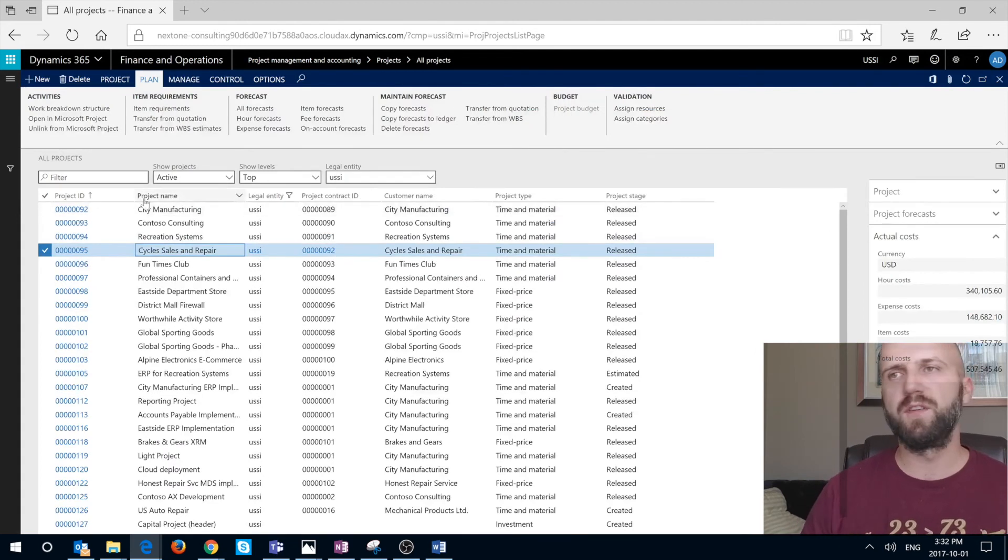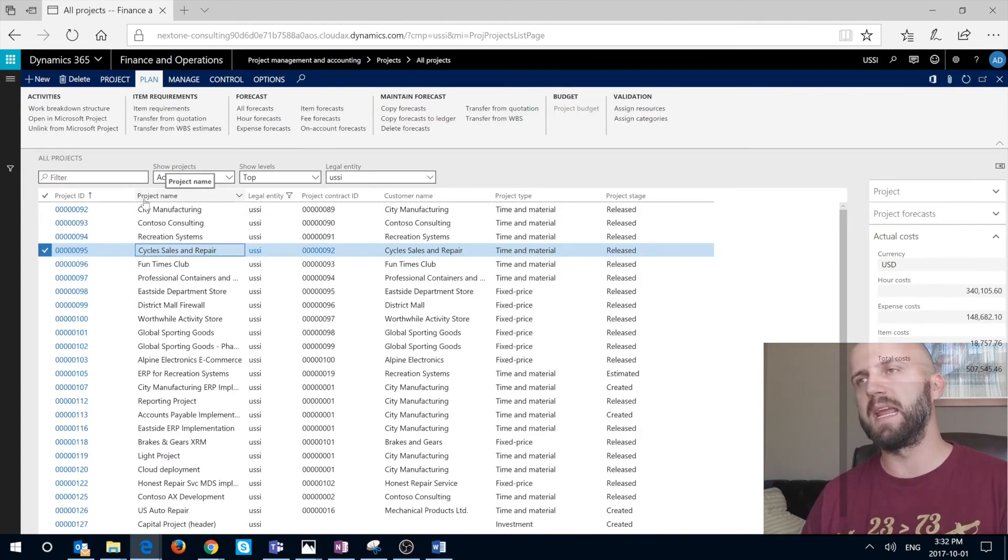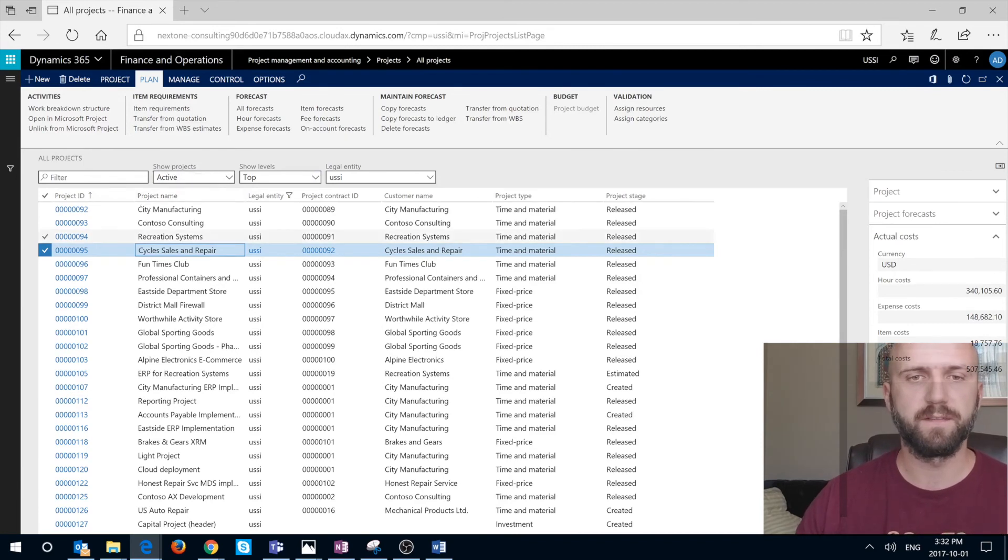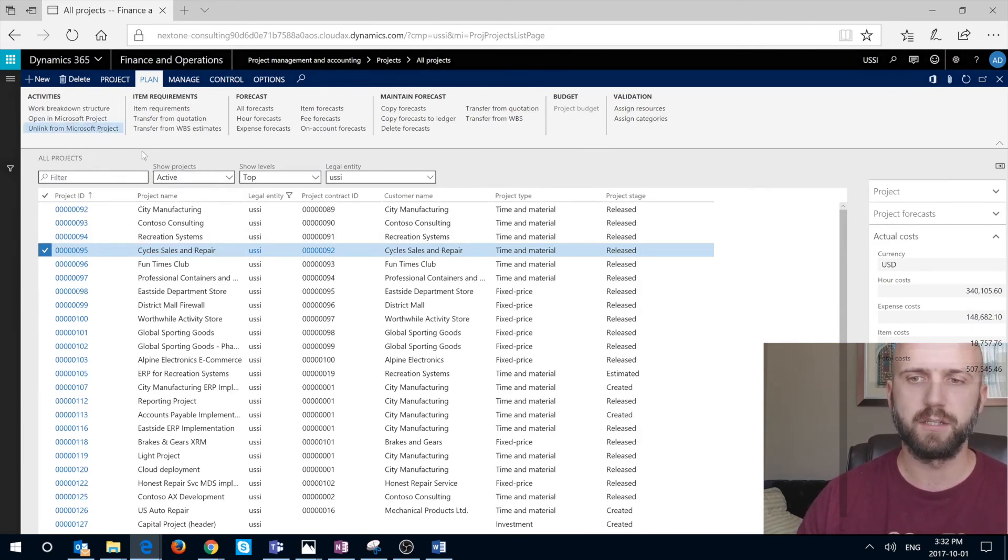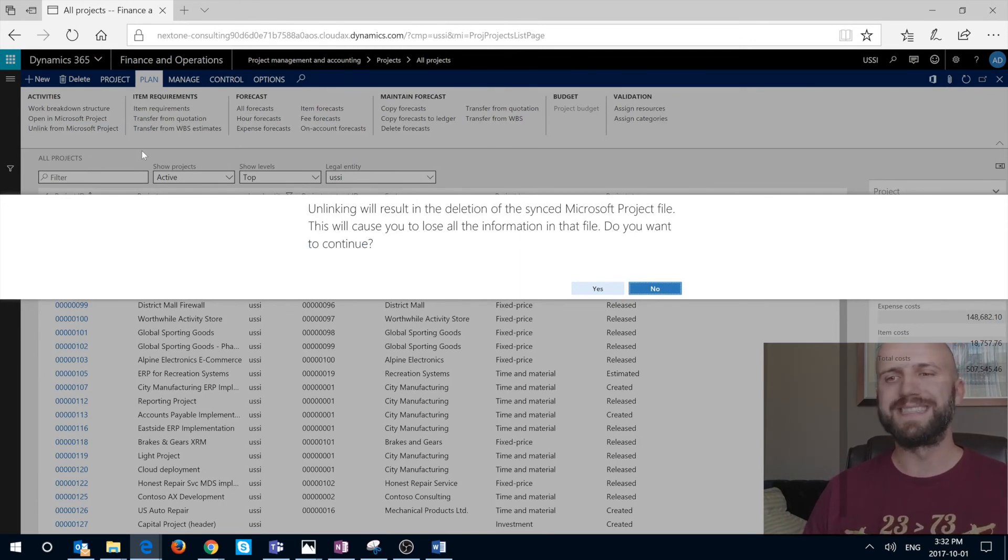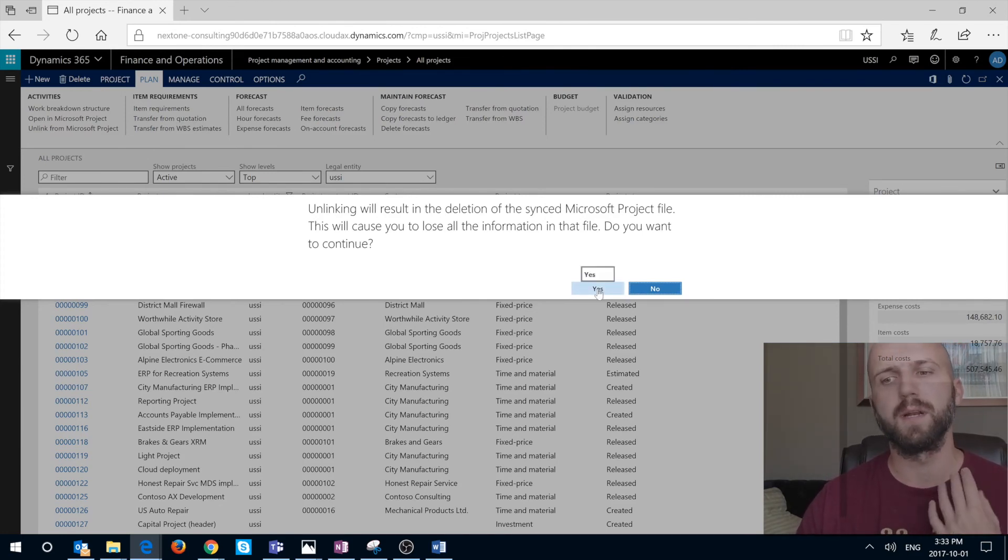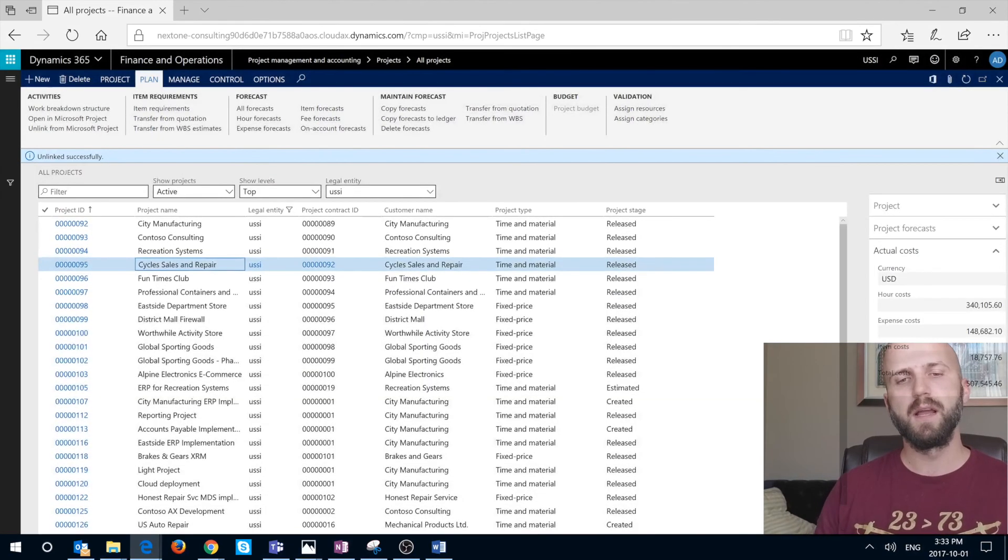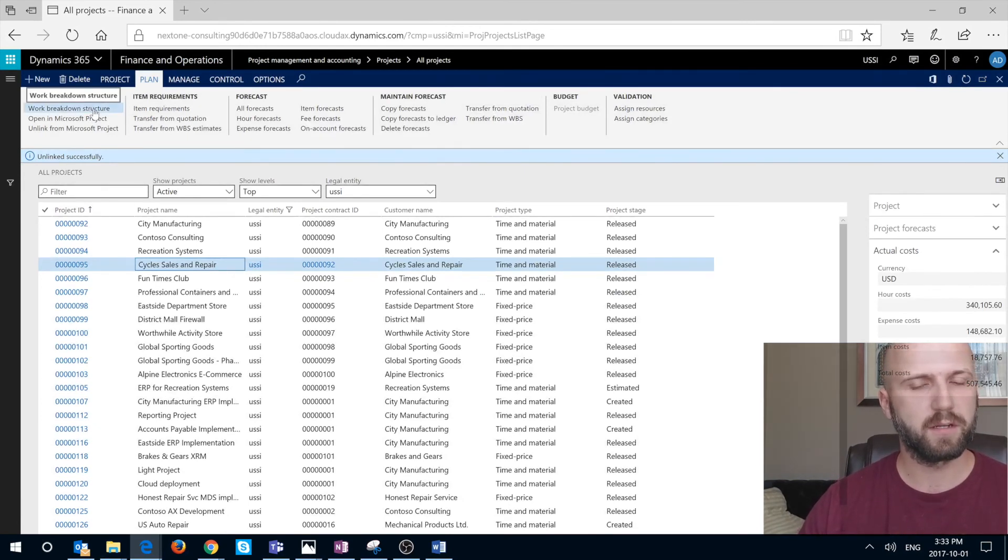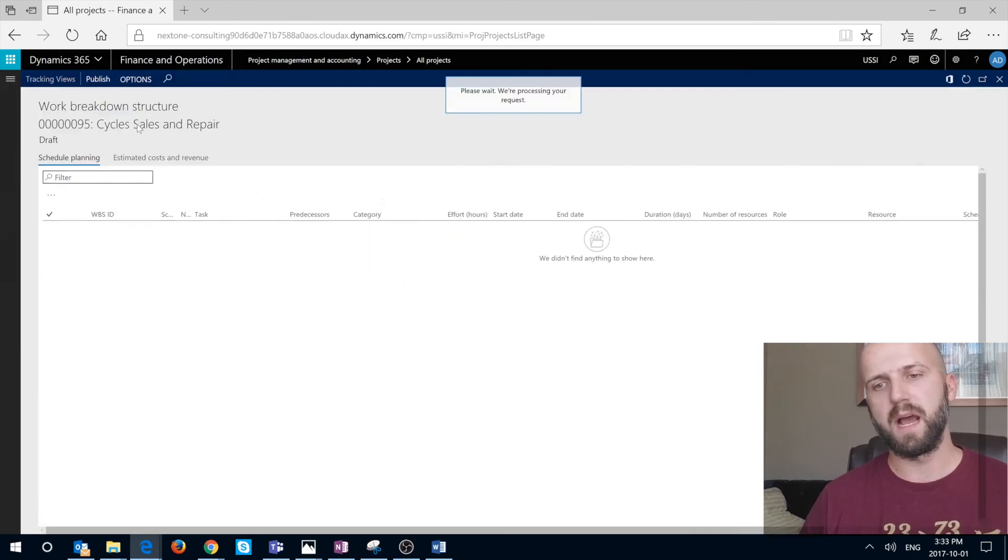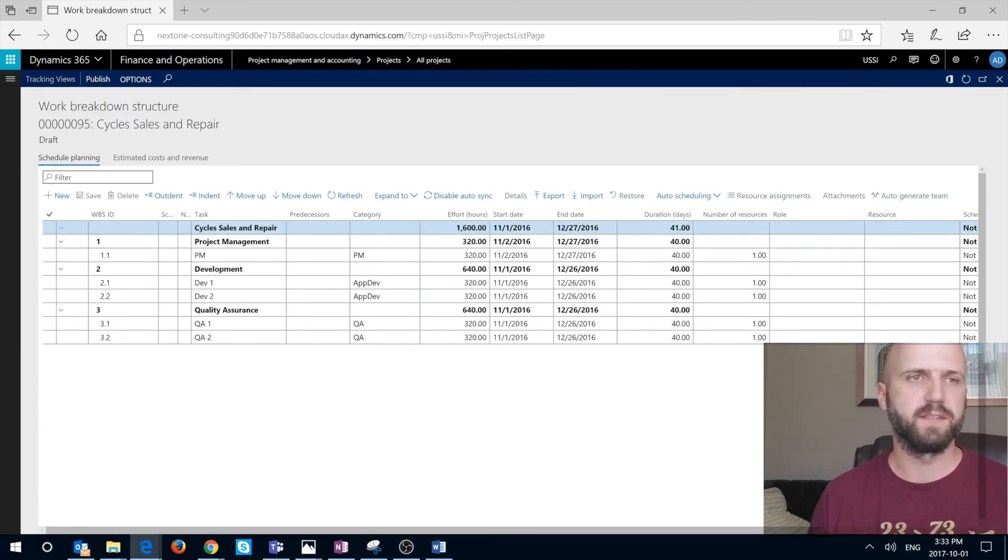Number two, if you would like to unlink and enable changes from Dynamics 365 itself, you need to click on this unlink from Microsoft Project. You're going to get this prompt: unlinking will result in the deletion of the sync Microsoft Project file. This will cause you to lose information in that file. Do you want to continue? But if you're going to say yes, it's going to throw you back into the original structure and allow you now to edit that structure using Dynamics 365, not the project.